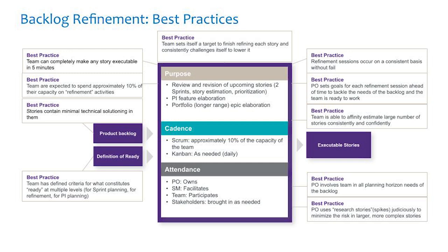And this can lead to what are called Agile spikes. This is also where you address the Agile spikes that I mentioned during the planning session. Items that you might have estimated takes 6 story points, but in reality you're on story point 30 now. That will be considered a spike, something you just can't get past. And that's when you set a deadline for the spikes as well during this backlog refinement. Does this need to be broken down even more because we can't solve it currently?